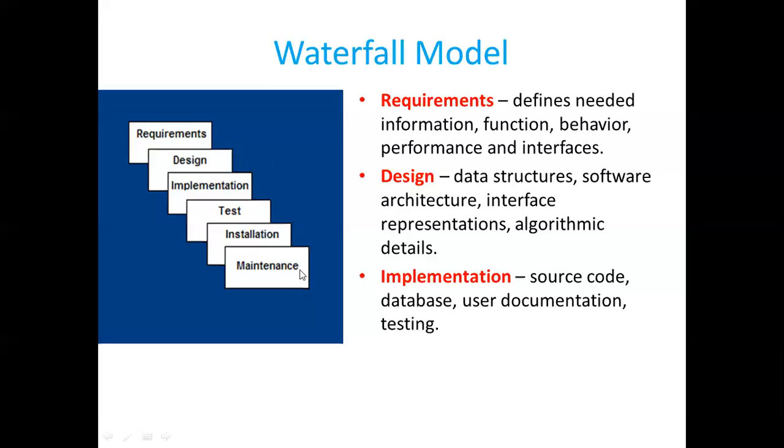So for example, we are the tester, let's discuss what is the difficulty here. In order to start the testing phase, you have to make sure that the requirements, design, and implementation are completed, and until then you have to keep quiet. If you don't have any other work, you have to keep quiet. You just have to come to the office and enjoy for some time and go home. That has to be repeated until you get work, until it is implemented. So that is one drawback. Testers will be in a waiting period if they don't have any other work.